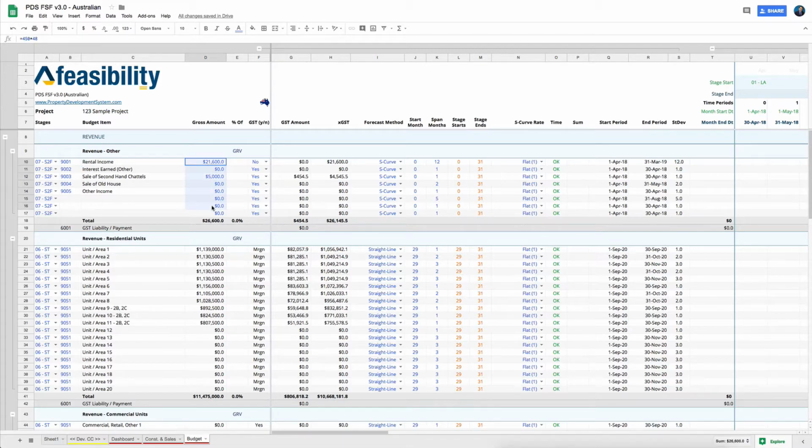You just have to come in, put in the values. If you're from Australia, you have to allocate whether or not it includes GST. Then all these details get allocated automatically. You've got your forecast method. These are only for you to allocate the costs based on the timeline. When do you think it's going to start, and what is the span? Now this doesn't tell you that it will be, one basically means a one-time payment, and if you've got money allocated here, that gets distributed. So if you watch the video on S-curve construction, you'll be able to understand what each one of these are.